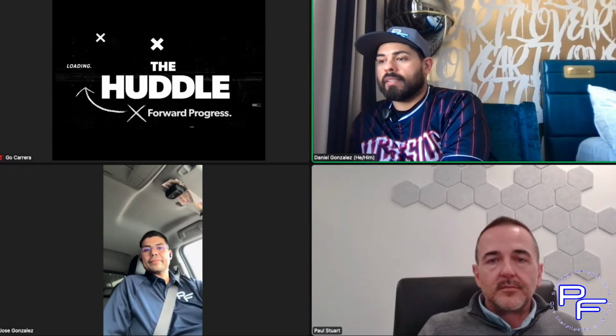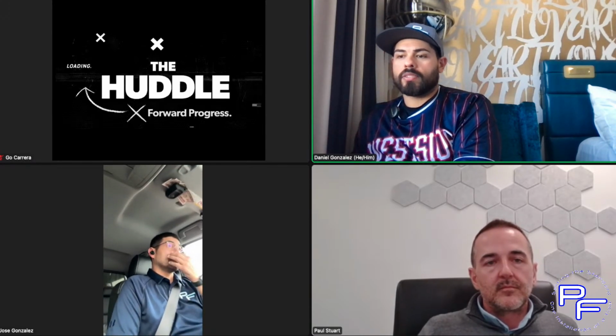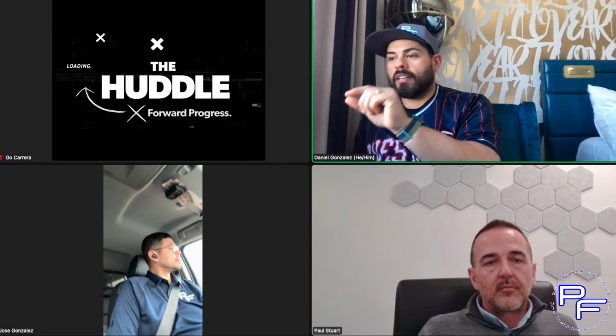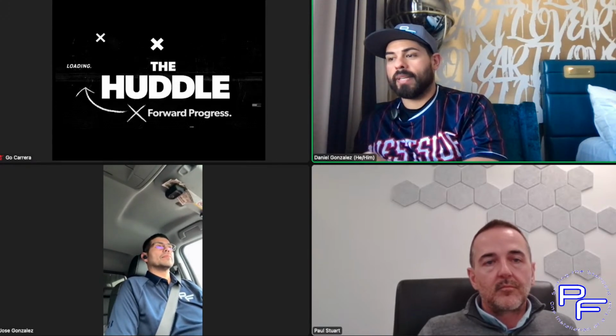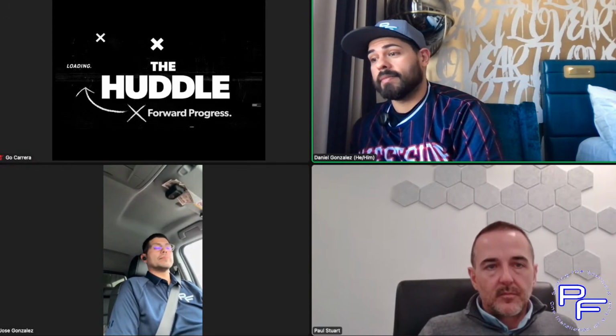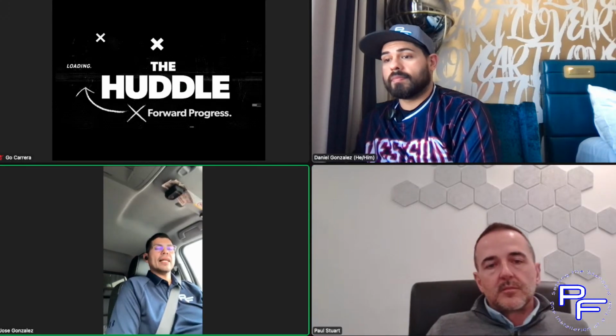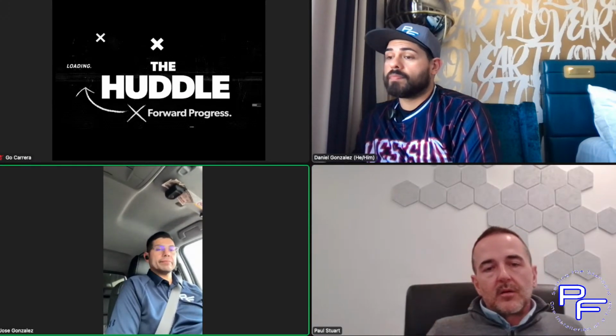I mean, that's the thing too, especially when you have it separated, it can be to the point where this is how much it's going to cost for this, but after the moisture readings come back, if you don't need it, then you just take that line item right out of there. Yep. I like that. That's a great piece of information there.